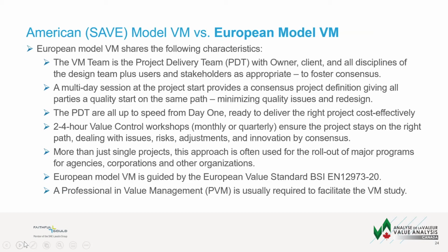Also in the European model, they have 2 to 4 hour value control workshops that are held monthly or quarterly to ensure the project stays on the right path, dealing with issues, risks, adjustments, and innovation that happens along the way by consensus of the group.